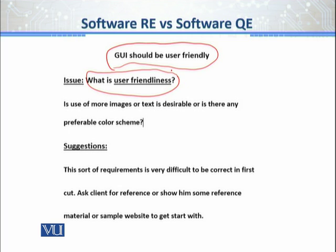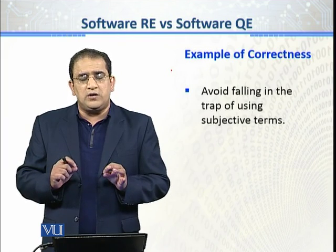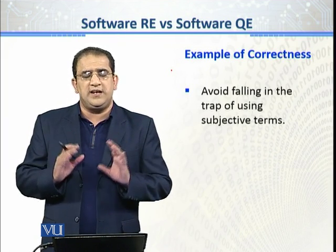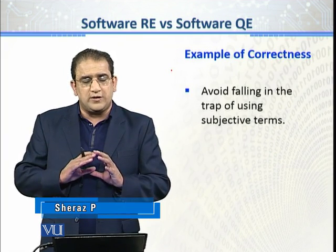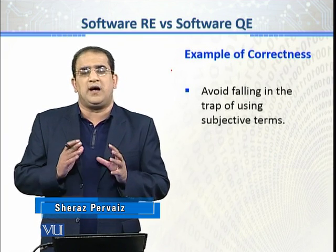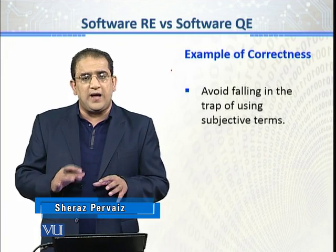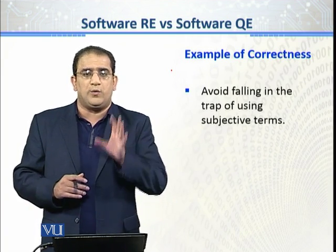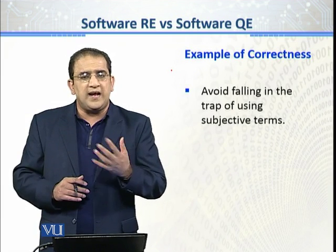Often the client has already seen a website and wants a clone of it, so ask them about it. Keep on asking questions unless and until you have some sort of vague picture or sketch in your mind of what the actual expectation is. When doing requirement engineering, never ever fall into the trap of buzzwords — the open-ended question trap. If you fall into that trap, it will surely lead to rework, and rework means the client is not going to pay extra money.